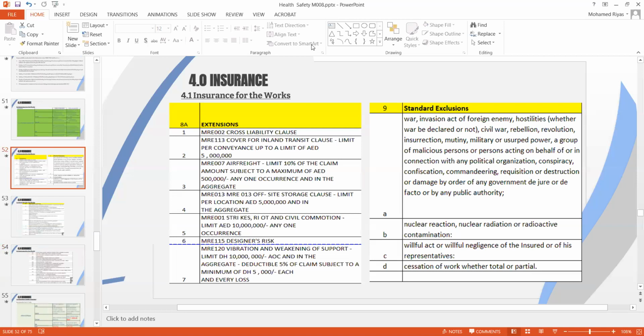On this extension provision, you can deal with many of the risks under the extension section. Usually the policy doesn't cover them, as they are in the exclusions, and you need to make sure that you extend to cover certain risks. This is why you need to do the risk assessment and see what could potentially cause harm to your project, to cover as much as possible under insurance.